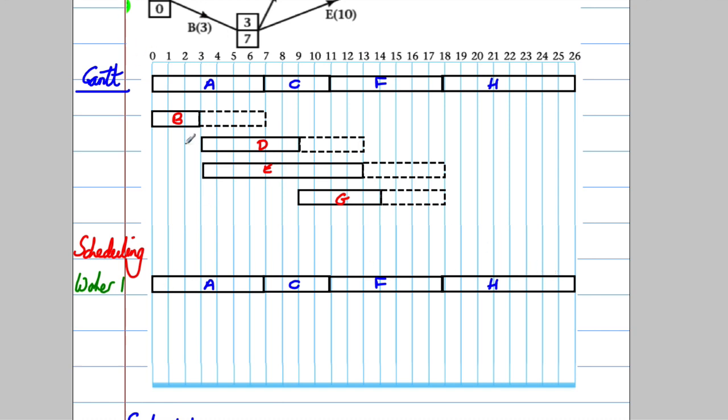Now the other activities you're going to need other workers for. So what you might want to do in this case is keep B. Let's see who we can assign to another worker, worker 2. In this case, worker 2 can get started on activity B straight away. No harm with that. So there we go, worker 2 can get started on that.